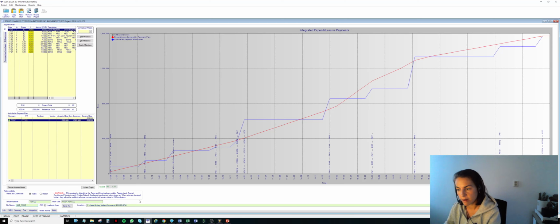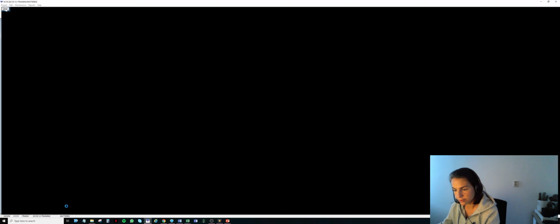So now I'm sure that all of my steps have been completed, right? I have a WBS. I entered my cost data. I've integrated my potential tenders. I've built my payment plan. I can issue my tender file. So I can click on Save As.